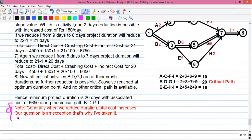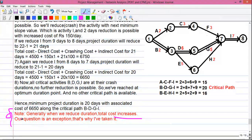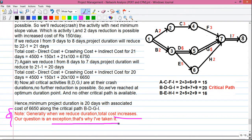One note: generally when we reduce the project duration, the total cost increases. But in this question, we were successful in reducing both duration and cost, which is an exception — and that's why this particular question was chosen. In other questions, you may see the project cost increasing as duration is reduced.